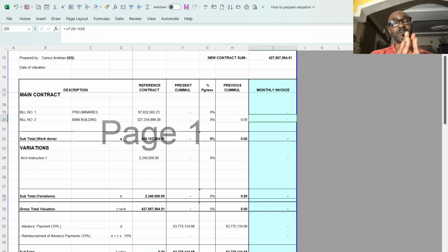If the contract is, say, 10 months, and you split all the preliminary figure into 10 months, and every month you are giving him a portion, the challenge there is the contractor might not be achieving the progress that he has proposed in his program of work that will warrant you to have paid him that figure that you split into the number of months the contract is to last. So if you do that, that means you are overpaying him.